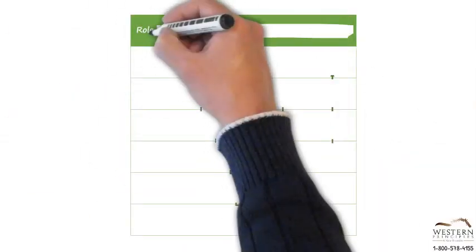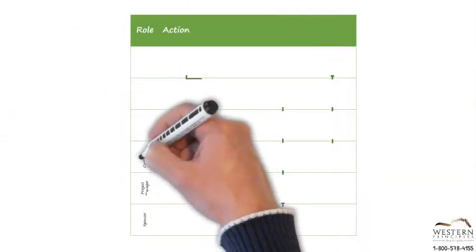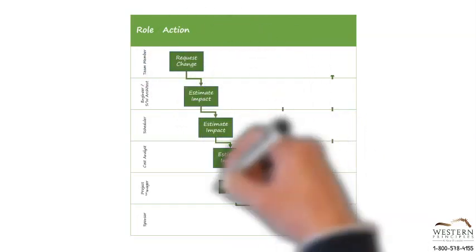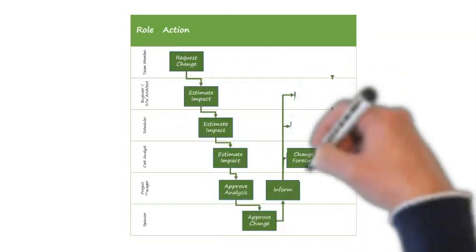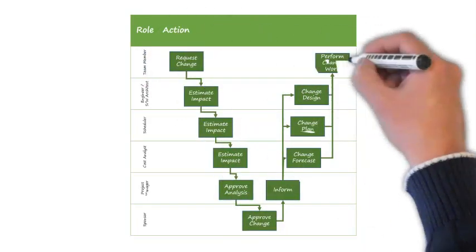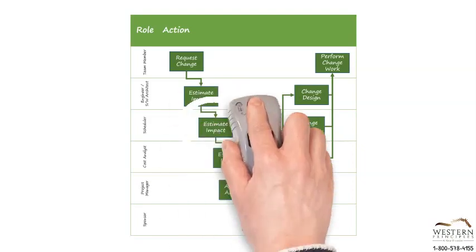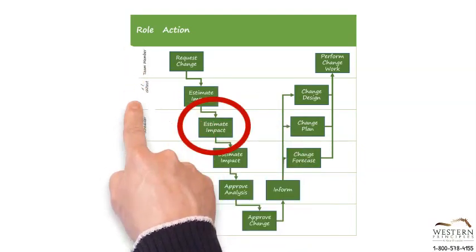Changes flow through a change request process and each business or even project might have a different process depending on the complexity and size of the project, as well as interdependencies with other projects and overall governance. The change request process should allow collaborative analysis and approvals by people like an engineer or system architect, the planner scheduler, and the cost analyst.